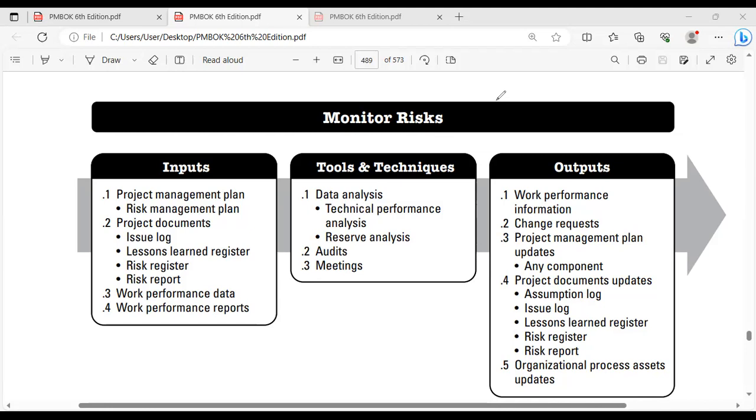If the reserve analysis shows that you don't have sufficient reserves in managing the remaining risk in your remaining work, so what are you going to do? You need to ask your management, right? So you make sure that during the course of your project, your risk start coming and attacking your reserves. But most of the few risky events will start eating your reserve more than what you planned. So you'll be using this kind of technique for you to find out whether you need extra reserve in covering the remaining work, or you have the resources so sufficient for you to complete the remaining work,